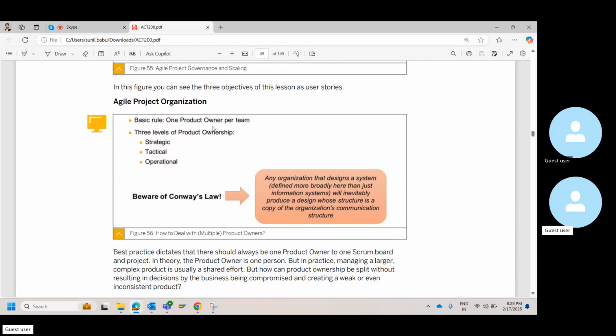However, under that person, there can be multiple people, wherein one person will take care of performance, one person will take care of learning management, one more will take care of employee life cycle, and another will take care of employee relationship. These might be different functions with different sub business process owners. However, for HR, there will be one business process owner. This is the rule that you have to follow. It's always recommended, when you are taking conversations during your prepare phase itself, for the stakeholder matrix.